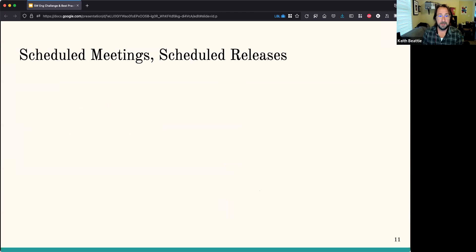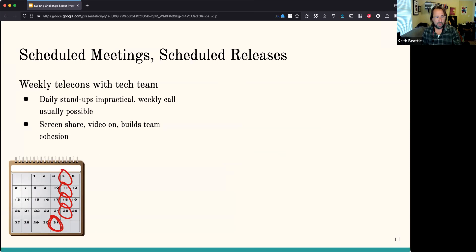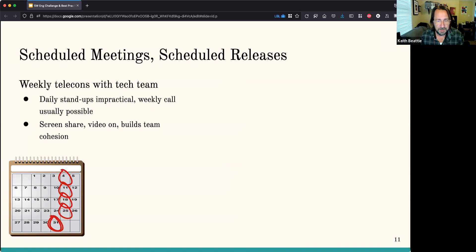What we do is have weekly telecoms with the technical team — that's somewhat analogous to the daily standups that Scrum talks about, but daily standups aren't practical for us. Weekly or every-other-week calls are usually possible, or even monthly depending on the pace of the project. I try to encourage screen sharing, and I encourage people to have their video on because it builds recognition and team communication and cohesion. Building the culture around the development and the relationships people have within the project is a really important part of all this.